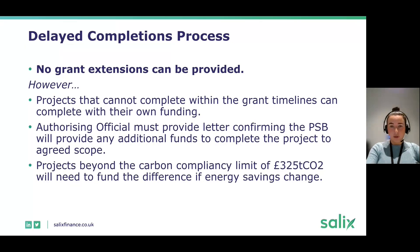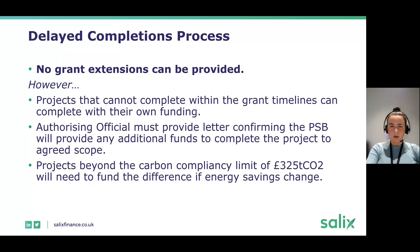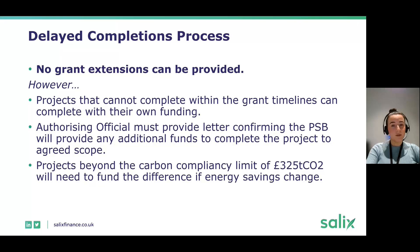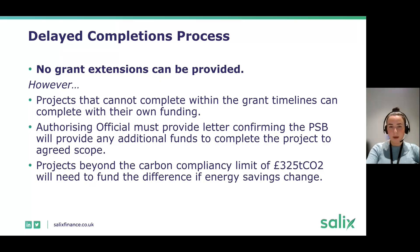Regarding delayed completions: no grant extensions can be provided, so you will not be able to spend the grant later than the 31st of March 2023. However, projects that can't complete within the grant timelines can complete using their own funding, considered on a case-by-case basis. The IO must provide a letter confirming the public sector body will provide any additional funds to complete the project to the agreed scope. If the carbon compliance limit is breached, the client will also need to fund the difference. Please reach out to your Salix relationship manager as soon as possible if this applies to you.